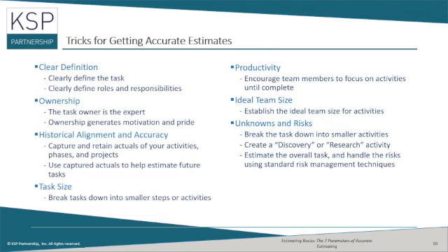Second, you can create a discovery or research activity. You can estimate that activity, and you'll find the rest of the activities fall into place. The third technique is estimating the overall task and then handling the risks using standard risk management techniques.